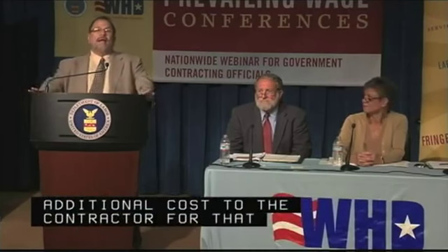And we've discussed this prior. Jay talked about a little bit under our regulations and the FAR as well in 1.6 F and G. If the agency fails to incorporate, they not only have to retroactively apply it, but they also have to address any additional costs to the contractor for that modification. Those are situations that we just want to avoid at all costs, and that's why your federal labor advisors, as well as my team, is always available to talk to you prior to contract award.